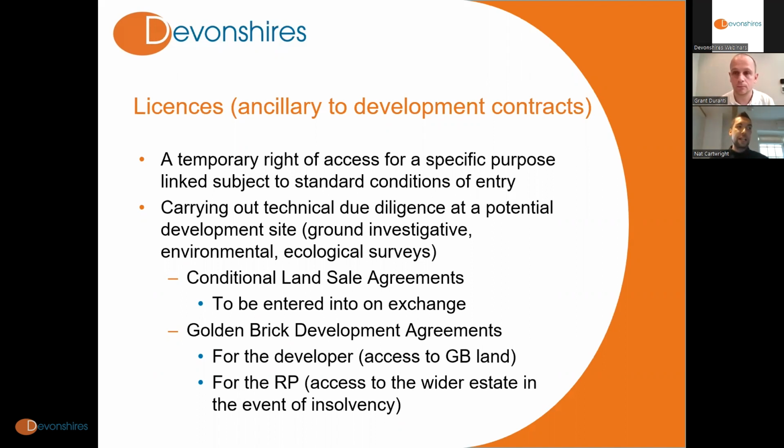So it's a good opportunity to get onto the land at the point of exchange and have a condition in your land sale agreement whereby you won't complete on the transfer unless the ground condition is satisfied, and that might be a satisfactory outcome of surveys and searches in relation to the technical DD, due diligence, that you'll be doing at that site. So they can be very useful for that purpose. And in that instance, we'd usually see a separate license appended to the contract to be entered into at the point of exchange.